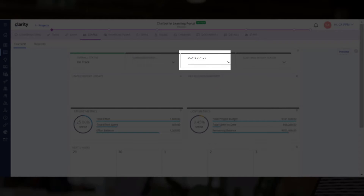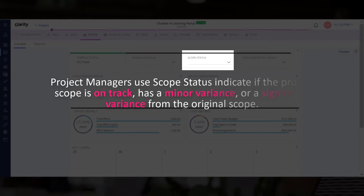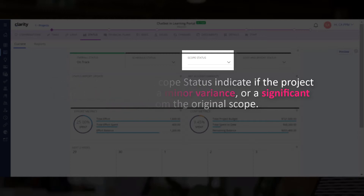Next, we can specify if the scope of the project has changed. Project managers use scope status to indicate if the project scope is on track, has a minor variance, or a significant variance from the original scope.